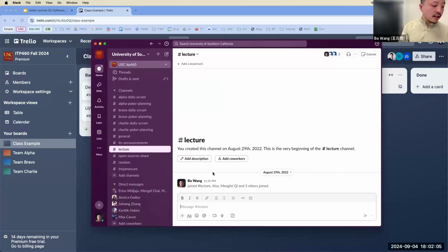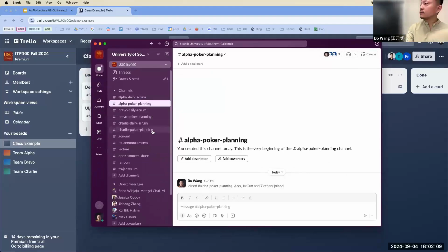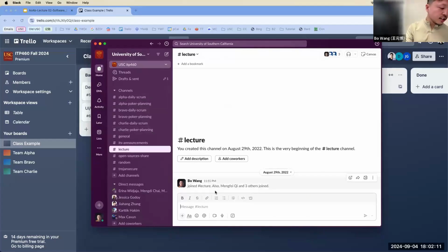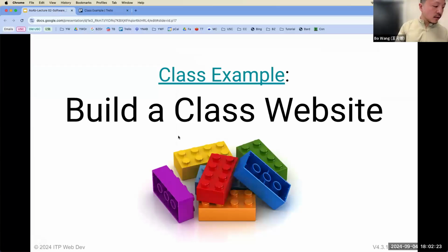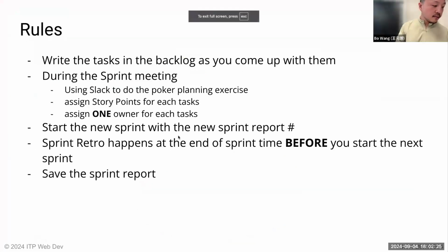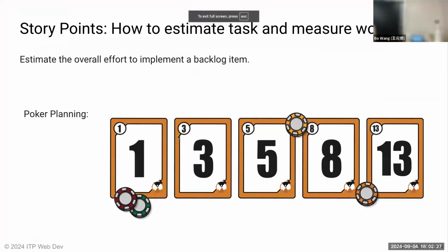In your poker planning channel, I will just use the lecture channel so that everybody can see. The 3 of us, me, John, and Diane, will put in a number. Coming back to the lecture, remember, the numbers are 1, 3, 5, 8, and 13.